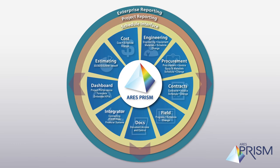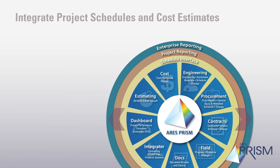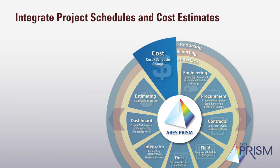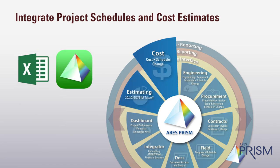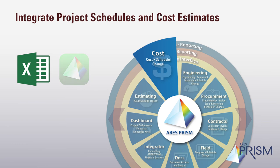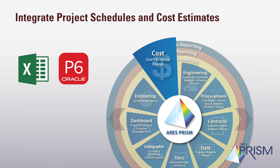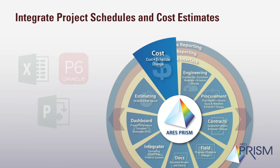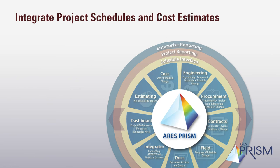Through the implementation of the Prism Cost Module, there are several key benefits that organizations gain. Integrated Project Schedules and Cost Estimates: Prism Cost helps organizations integrate schedules and cost estimates to develop time-phase budgets and forecasts. You can import the estimate directly into the Cost Module from Excel or Prism Estimating, and you can import your schedule from Excel, P6, or Microsoft Project. Now you'll be able to have all of your project data in one centralized location.